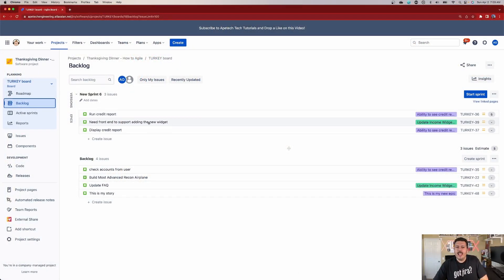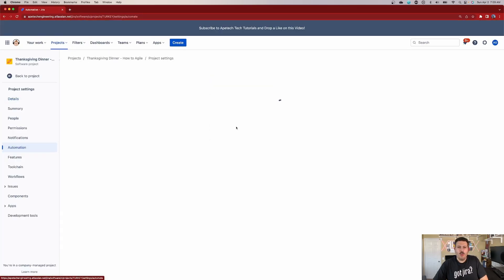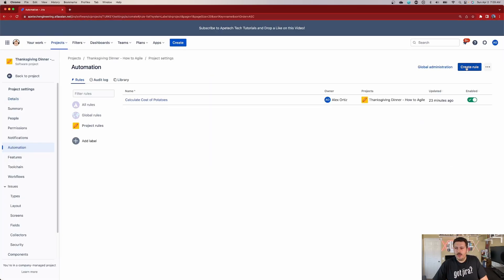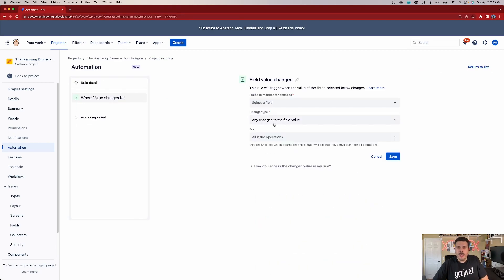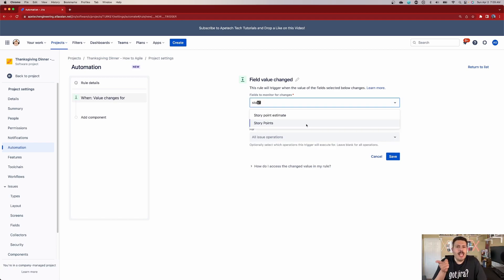Let's get back into Jira. Go to project settings and then to automation. Once you're there, we're going to create a rule. The trigger is going to be a field value change, and we're looking for story points. If you type in 'story,' you'll see 'story point estimate' and 'story points.' Please don't make this mistake: if you are in a team managed project use 'story point estimate,' but if you're in a company managed project — which is what you should be using — you're going to use just 'story points.'